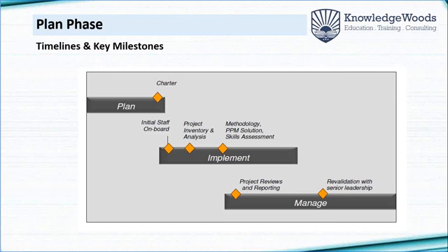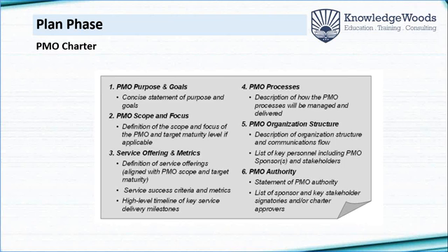Once these things are done, the most important part is to document, get approval, get a buy-in from the stakeholders, document everything in the charter and get a sign-off. This is very, very crucial. It cannot be skipped and you cannot proceed without getting a sign-off, without getting a buy-in from the stakeholders and the sponsors. So everything that we discussed in the plan phase should be documented. It's an overview document. Right? And get a sign-off and buy-in.